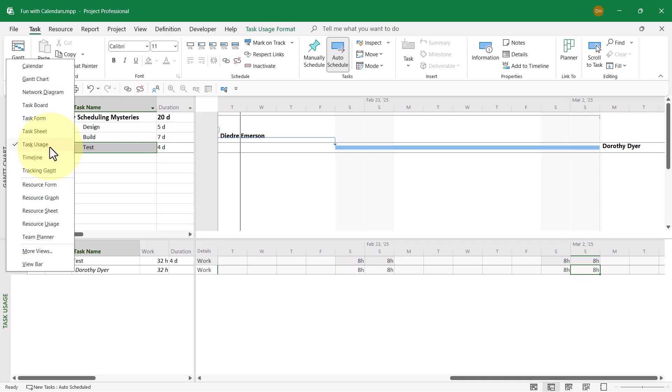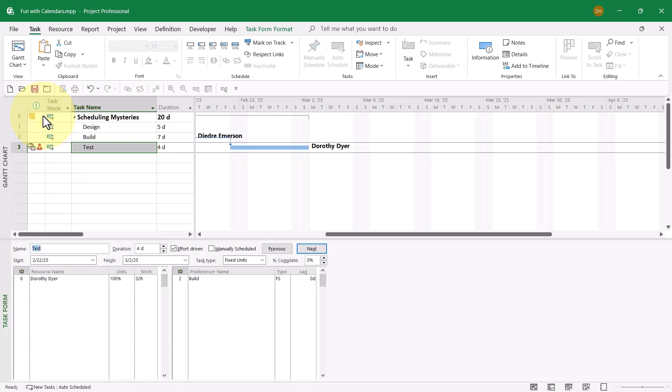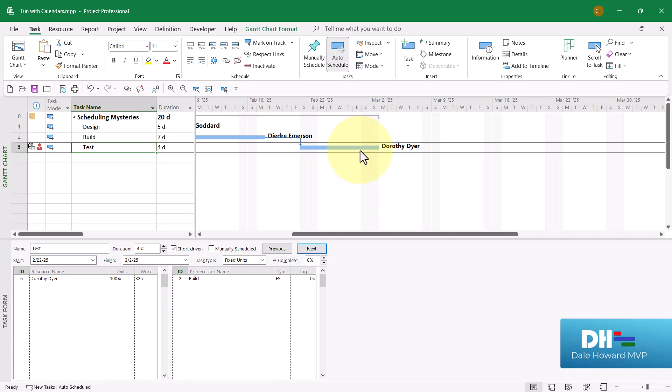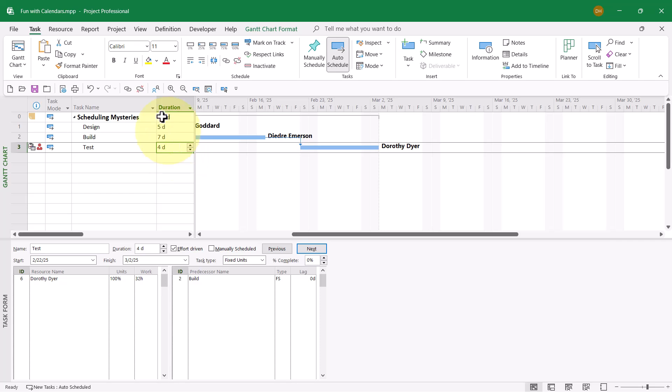Let me go to the task form view again. Here's what most people expect. Most people expect that we would not have a solid Gantt bar. They would expect two days of solid blue, then dots through the rest of the week, then two more days of solid blue. But that is not how Microsoft Project draws the Gantt bar for this task. Even though it makes it look like Dorothy is working both weekends plus the week in the middle, you now saw in the task usage view that she only works the two days of each of the two weekends for a total duration of four days. That's how you can use these troubleshooting tools to diagnose scheduling problems in your Microsoft Project schedules.